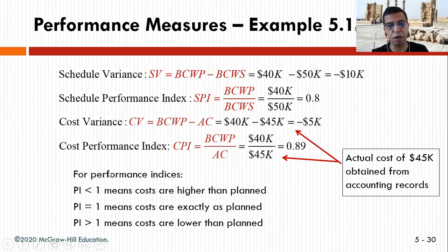And if the PI, the performance indicator, is lower than 1, costs are higher than the plan. So your cost is way higher than your plan. But if it's equal, the cost at any point is exactly matching the plan. And if the PI is higher, it means the cost is lower than the plan. So if you're planning like 100,000, but the cost is 150,000, something like that.